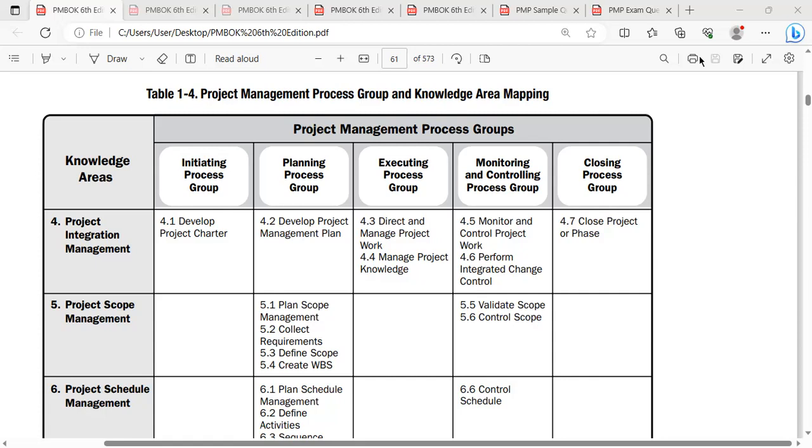If you're going to bring in a new stakeholder, or you're not satisfied with a contractor and you want to replace them, make sure that you bring the new contractor inside and update the stakeholder register. So until you have the complete stakeholder list that is specific to that particular time of the project, you are not able to develop your communication management plan and the stakeholder engagement plan, and you are not able to collect the complete requirements from the stakeholders.